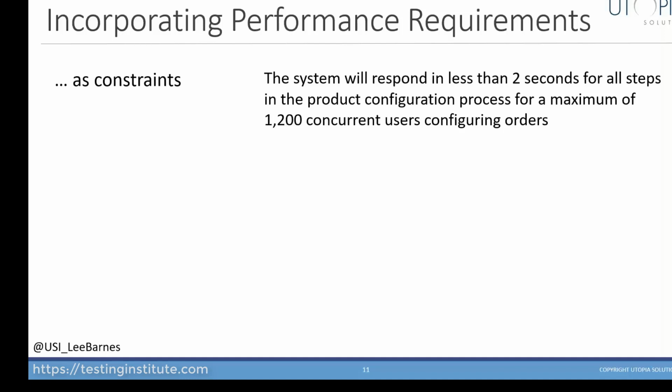One of the more popular approaches is to include performance requirements as constraints that certain or maybe even all stories need to meet. Performance requirements, things like response time, support for a number of concurrent users, or some volume of throughput, will often apply to many user stories. So as we create those stories, we can link their acceptance criteria, as appropriate, of course, to these existing constraints.